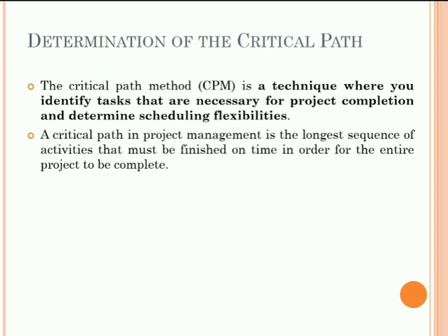The second step we can consider is identifying the dependencies. Based on the work breakdown structure, determine the tasks that are dependent on one another. It will also help you to identify any work that can be done in parallel with other tasks. Let us see some of the task dependencies based on the example we have seen about making a blog or posting the blog by creating that blog.